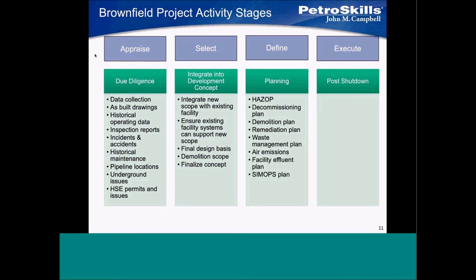Then planning — or define, or what some people call front-end engineering development or FEED. And then you see all these other things: HAZOP, decommissioning, demolition, remediation planning if you have soil to manage, waste management — think about offshore — air emissions, facility effluent plan. If you start blowing things down, you've got to do something with the effluent.